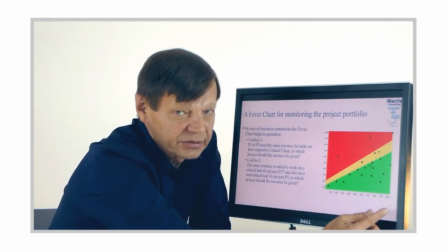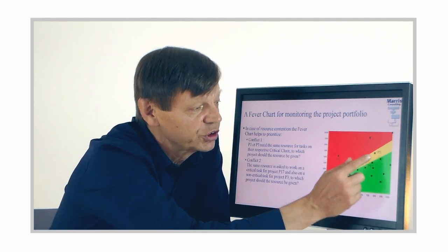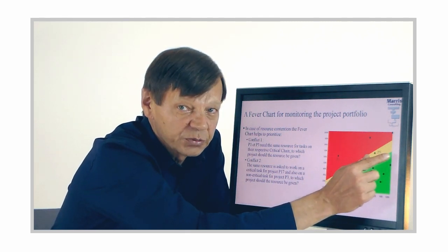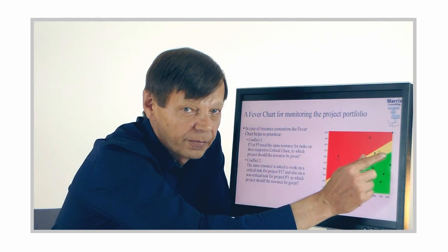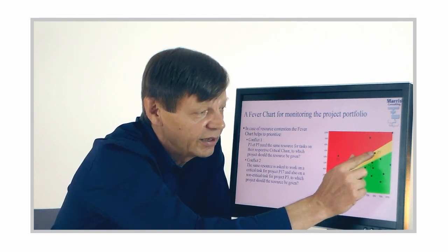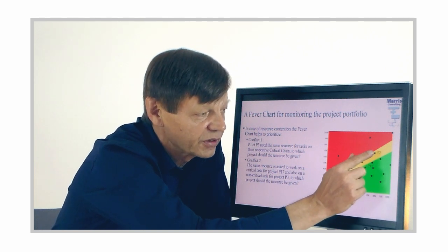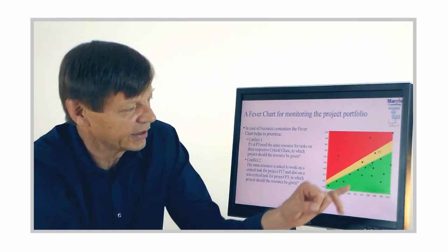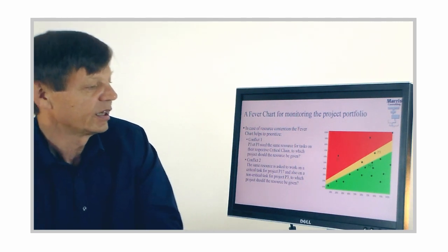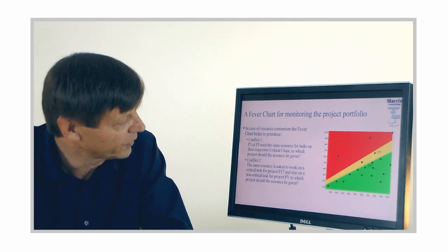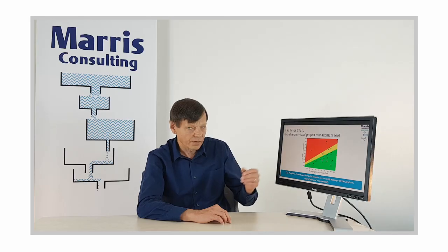We're measuring progress on the critical chain. So that resource could not help that project move forward. Okay? It wasn't actually working on the critical chain, it's working on something else, right? So there's no point in it going there. It actually has to work on this one. Okay, so that's the notion of critical and non-critical. Be clear. So to summarize,